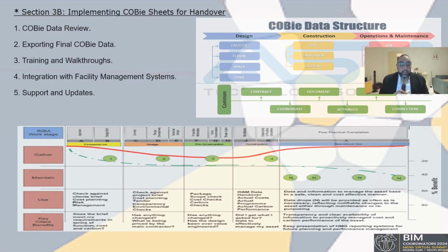Integration with the facility management system: assist the operations team in integrating the COBie data into their existing facility management FM or computer-aided facility management CAFM systems. The integration allows a seamless transition from the construction phase to the operation phase and enables efficient asset tracking and maintenance planning.